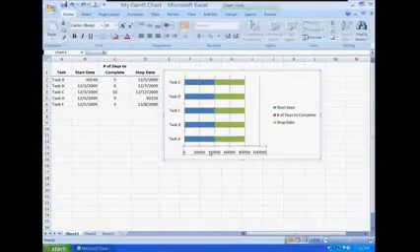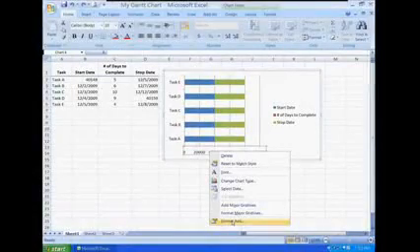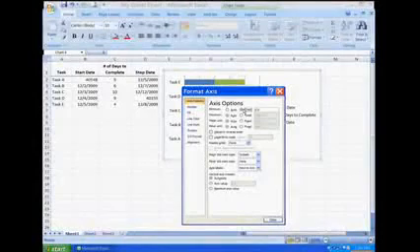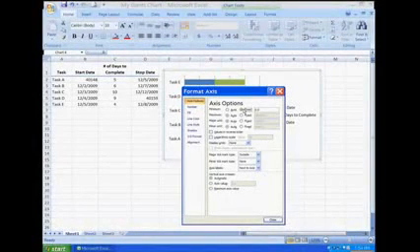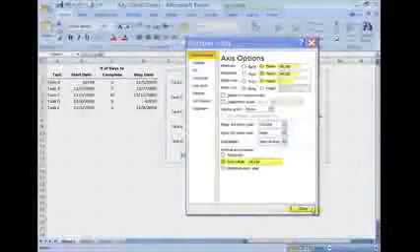Click on the numbers along the bottom to select the x-axis. An outline shows it selected. Right-click on it to open the menu, and then click Format Axis. Under Axis Options, next to Minimum, click inside the tiny circle next to Fixed. In the box next to it, enter the earliest start date in its general format, which is 40148.